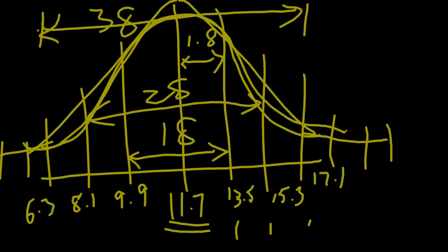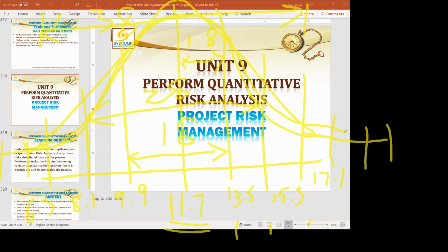But what you have planned, your TE was 11.7. So you say, no, my project was to be done in 11.7 days. That's what it is. He is saying it will take 15 days. Now, how much effort should you put in, and if you try to reduce the project duration from 15 to 11.7, how much is the percentage of probability that you will be able to do it in that much time? So the computer will tell you that to do this project in 11.7 days, the possibility is just 70%. That means you carry 30% risk in completing the project earlier than 15 days.